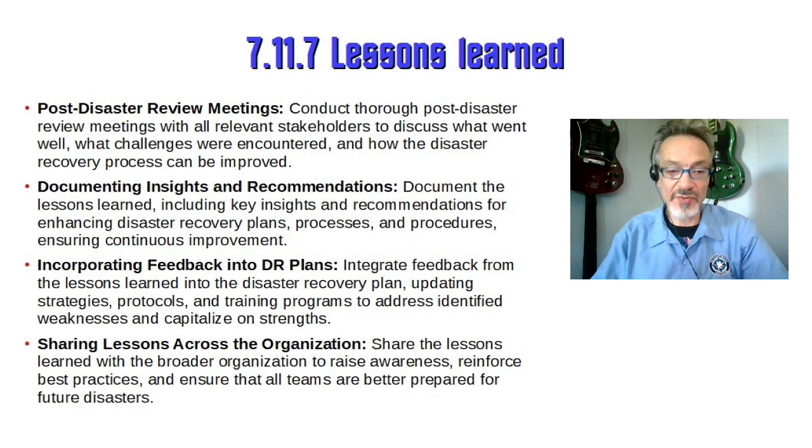After the disaster recovery process is complete, hold post-disaster review meetings with all relevant stakeholders. Discuss what went well, the challenges encountered, and any gaps in the recovery plan. 2. Documenting insights and recommendations. During the review, document the lessons learned and any recommendations for improving your disaster recovery plan. This ensures continuous improvement and helps your organization be better prepared for future incidents.